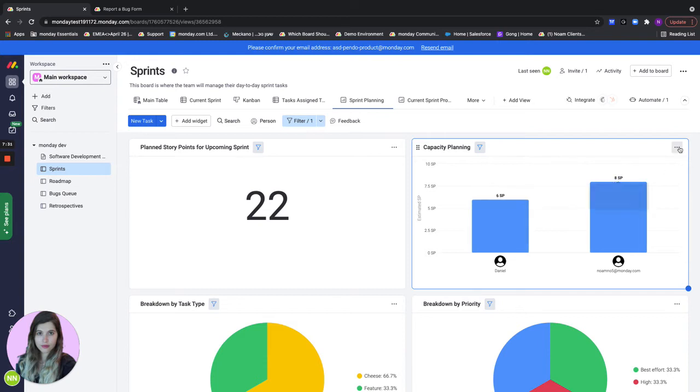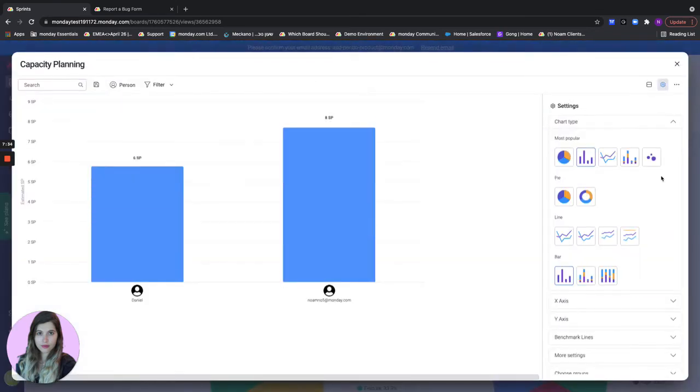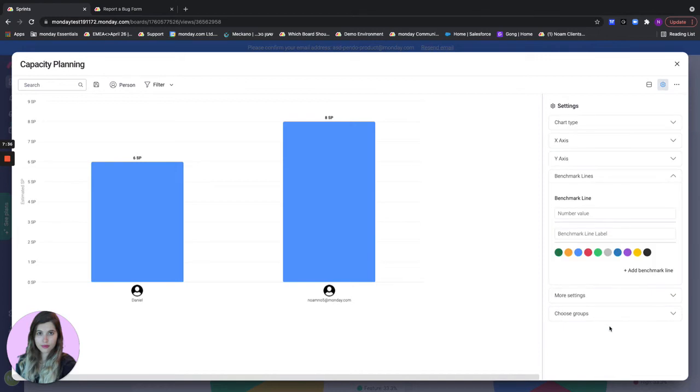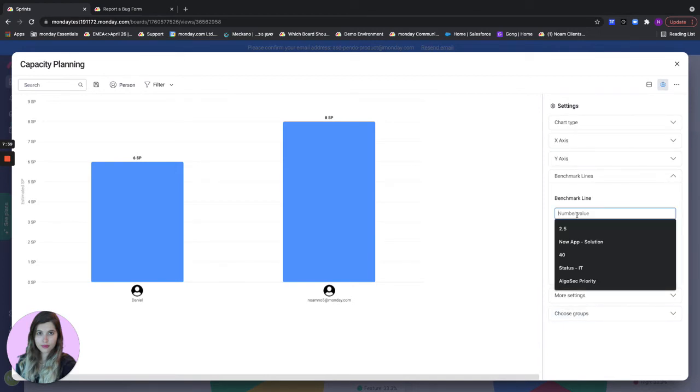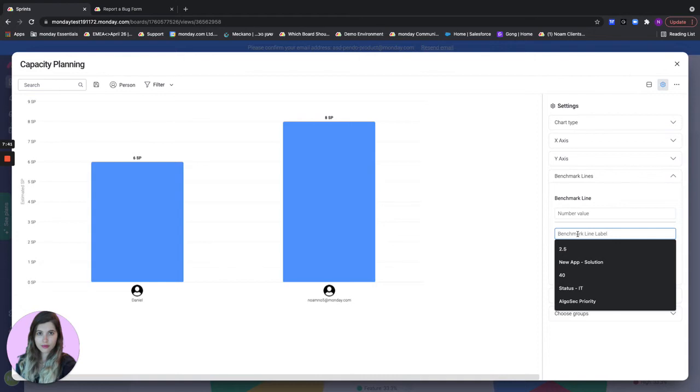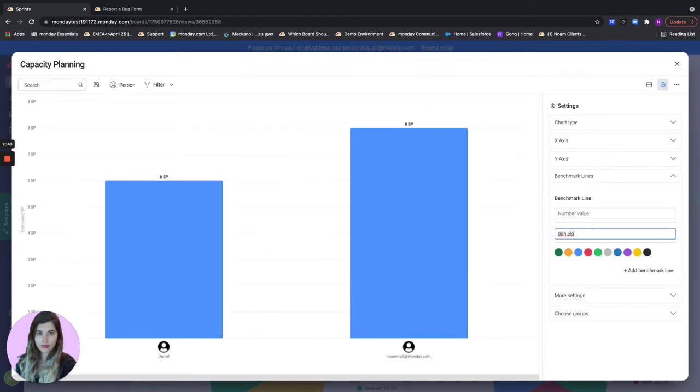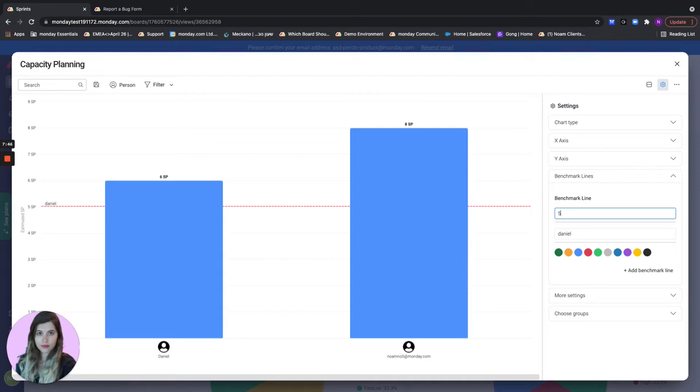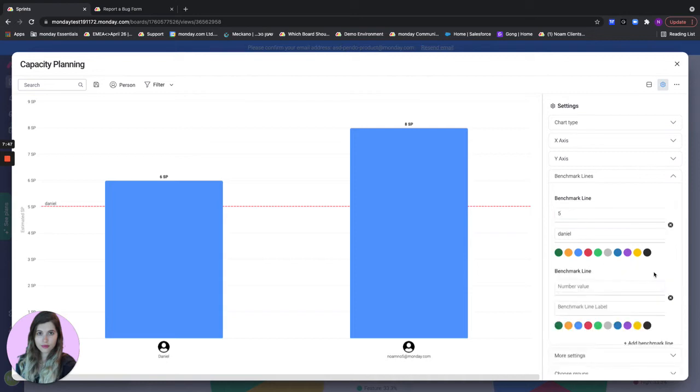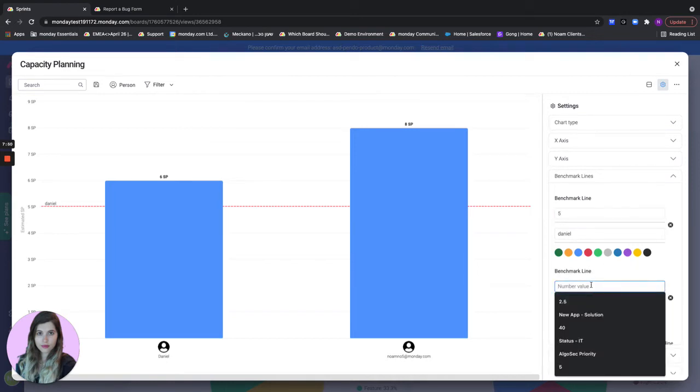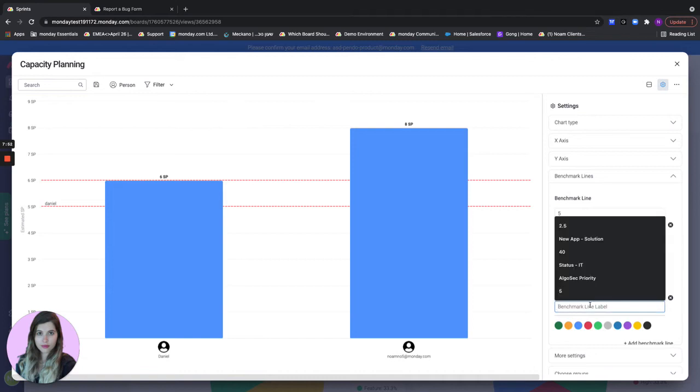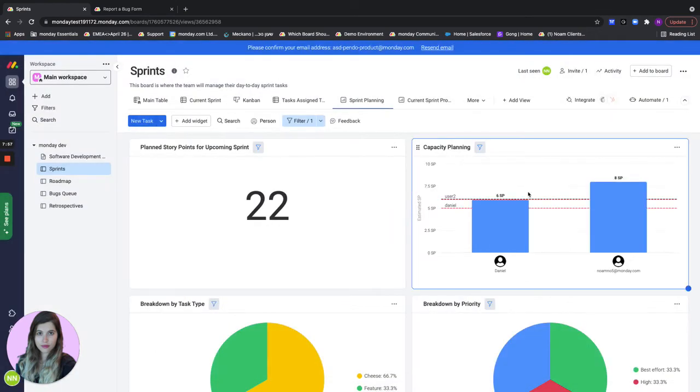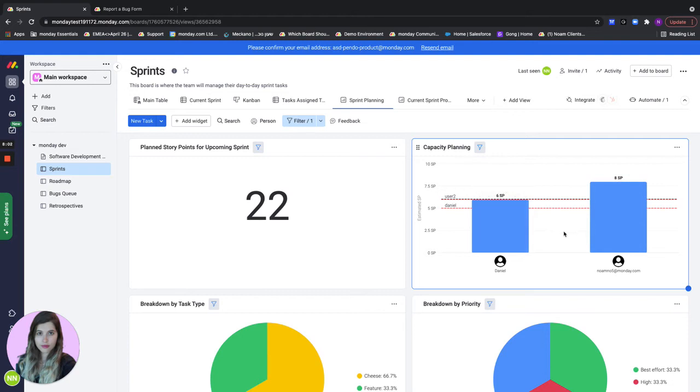What I can also do in here, I can go to the settings and actually add benchmark lines for each of my team members. Let's say that Daniel's benchmark is five story points and the other user benchmark is six story points. This way very easily I can see that both Daniel and user2 are already above their possible capacity.